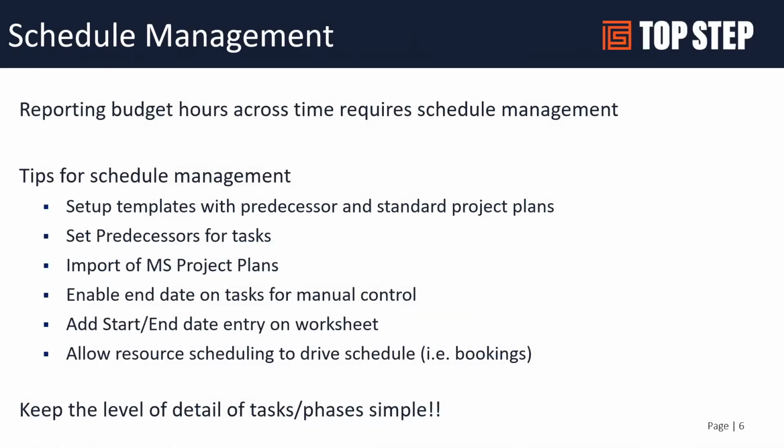Another component of earned value is not just how many hours do we have and how many dollars do we have, but what's our time frame to complete this project. And in order to really get earned value, you have to have a time frame represented in OpenAir. Now, there are definitely multiple ways to represent a time frame, and depending on which way you would set your system up will depend on whether you have the ability to use some of the standard out of the box earned value reporting, or you'll need to create custom earned value reporting metrics.